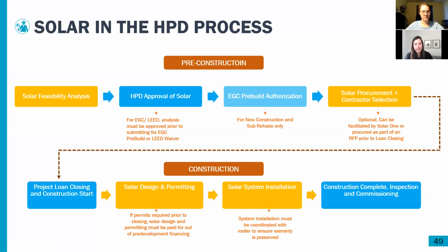And once you get your solar feasibility analysis approved by HPD, you'll move on to procuring and selecting a solar installer. And this can be done before closing or after. It's often done before closing so that you can get the most accurate pricing for your budget.